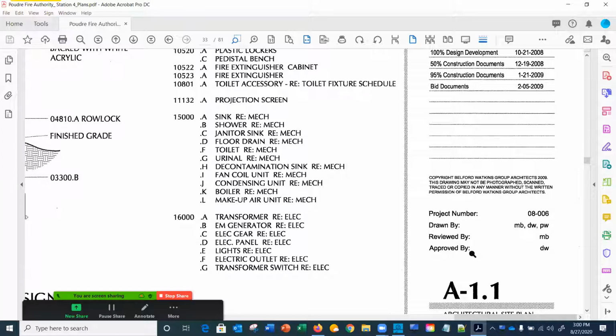And then some smart project manager came along and did what I'll teach you in the survey class and walked around and realized that something doesn't look right. So they had to chisel it out, and our insurance had to pay for it. So drawing management is part of that time frame, and you really better make sure you've got the most current drawing.